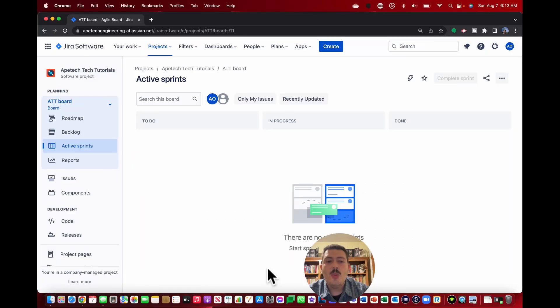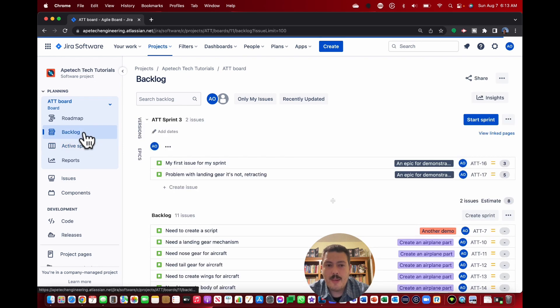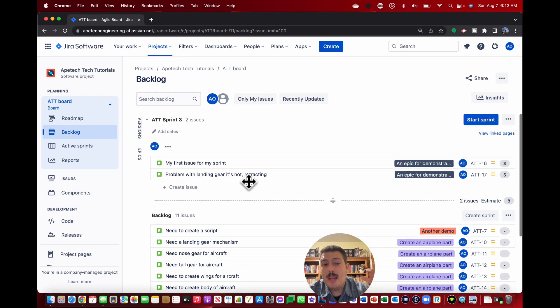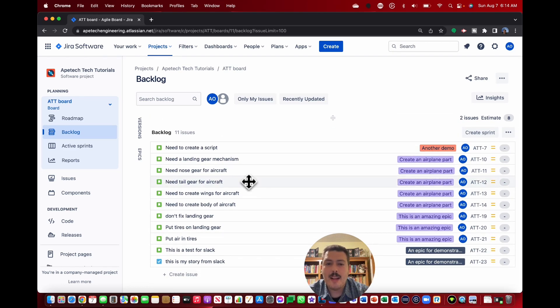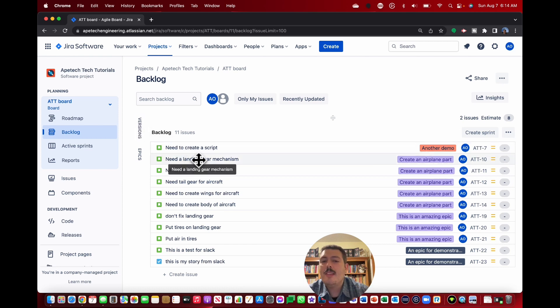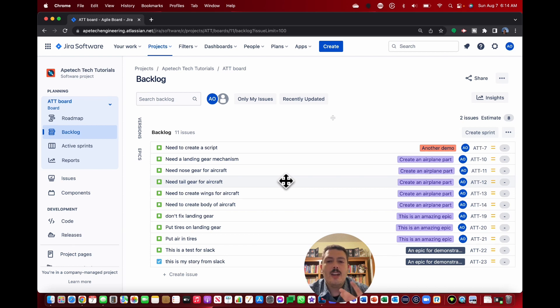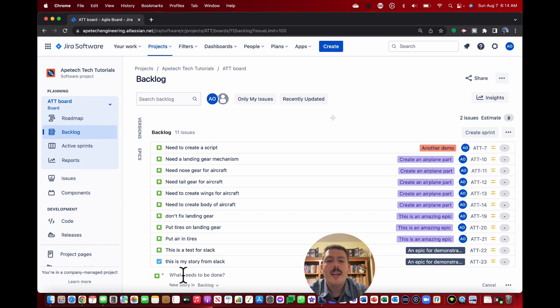Now let's talk about the where, and to do that I'm going to jump into Jira and show you. Within Jira you're going to be in a very specific area — thankfully Atlassian has made this very simple. You're going to be in the Backlog. You'll have a sprint maybe at the top, but you want to come down to the backlog section where it says 'Backlog' — this is where the magic happens. This is where you want to start ranking and grooming. If you need to add more stories, you can quickly create an issue and add any additional details or work that might have been missed in prior sessions.